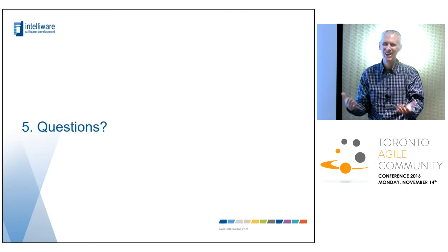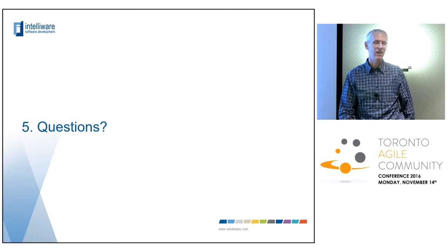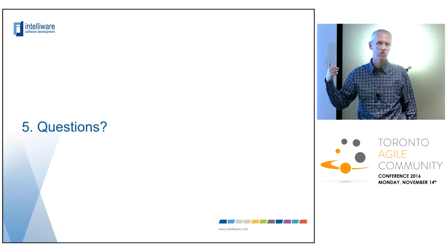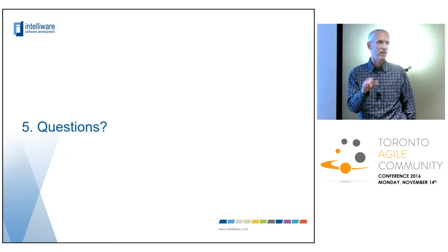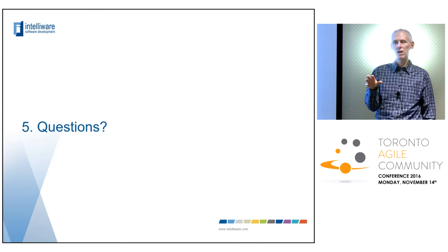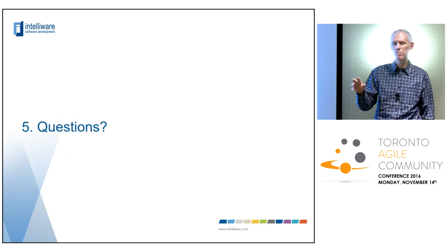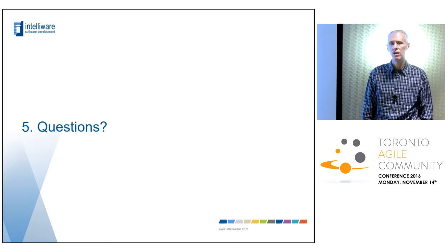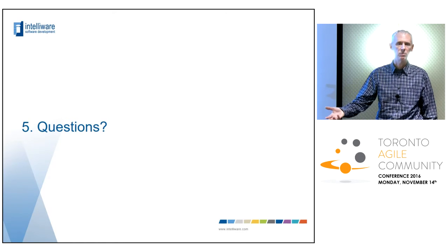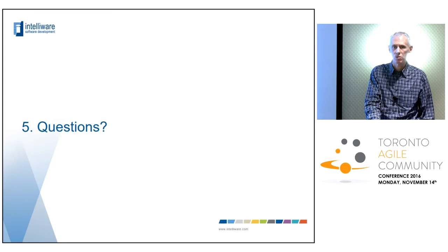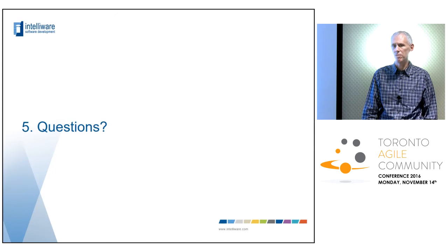I've often found that to be the case. That's why I mentioned earlier, make sure that you don't go too far off that two-thirds number. You might have some more junior developers, and actually it works the opposite way. More junior developers often have fewer distractions, so they can immerse themselves in the code base more. And I've generally been involved in discussions where we've assumed slightly higher velocities for people who are newer, or they may be experienced, but they just don't have distractions for whatever reason. They could be a highly experienced developer, but they're new to the company, and this is the only project they're working on. You could probably get away with a slightly higher velocity for them, but you need to be really careful.